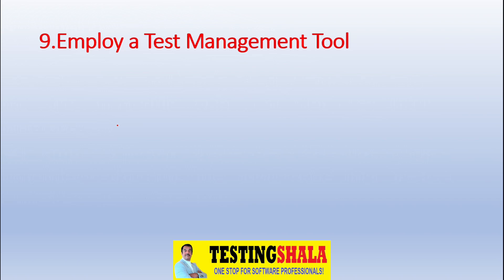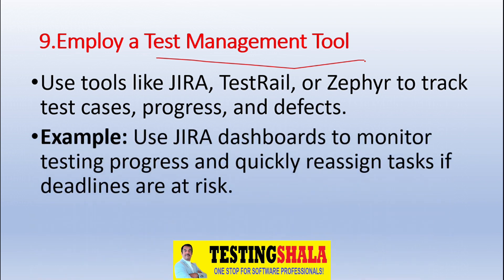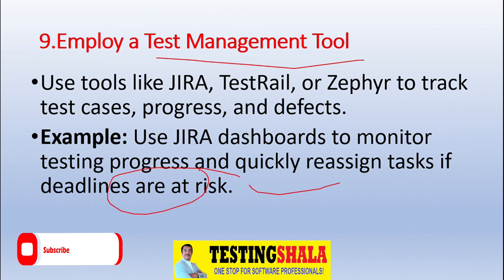The ninth method is adopting a test management tool like Jira, TestRail, or Zephyr to track all test deliverables including test cases, their progress, and defects. These tools provide a complete dashboard to monitor testing progress and allow you to reassign tasks if deadlines are at risk.